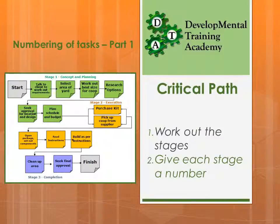The first thing we need to do is number our tasks, which requires us to divide our project into stages. There could be 3, 10, or 100 stages depending on the size of your project. Our chicken coop project has been divided into 3 stages. Stage 1 is concept and planning — that's all of the green section. Stage 2 is execution — that's all of the yellow section. Stage 3 is completion — that's the blue section. Each stage has a number, which helps us number our tasks.